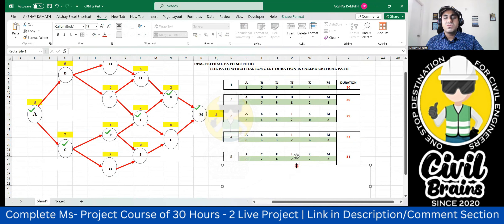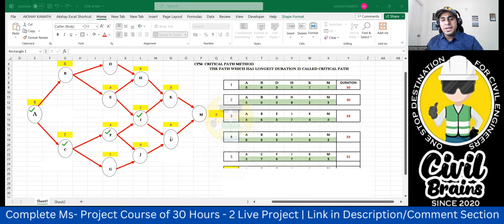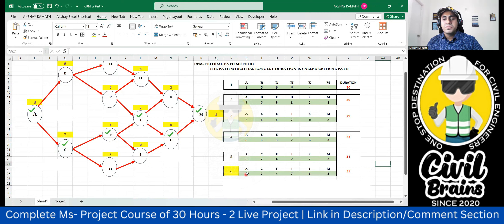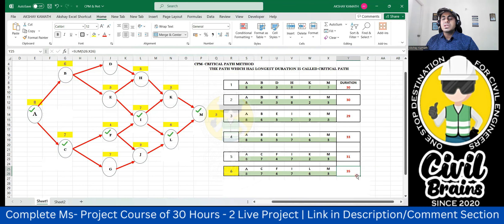Another path using the C route: A → C → F → I → L → M. From I, take L instead of K. Durations: A = 8, C = 7, F = 4, I = 7, L = 6, M = 3. Total: 8 + 7 + 4 + 7 + 6 + 3 = 35 days.